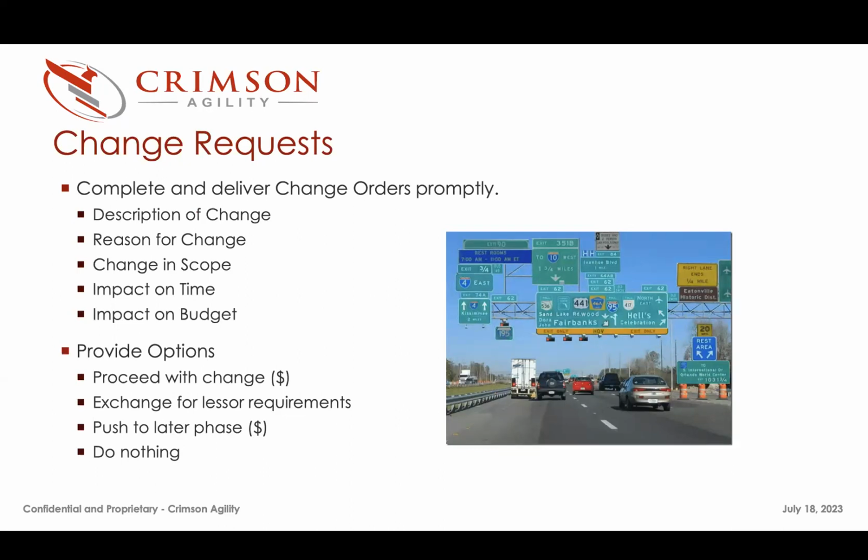You want to document that change. What is the impact on the timeline? Sometimes it's only an impact on budget. Sometimes it's an impact on time and budget. But outline or document the impact on time and budget. You can group a bunch of changes together.